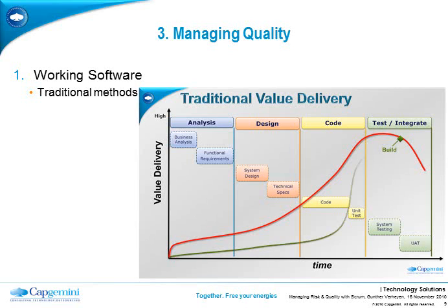As soon as you start, you will not create any working software. You work on paper during analysis, design and so on. You merely work on paper. You've got sign-offs, but that's it. There's nothing that you can taste, that you can feel, that you can use, that you can work with. You can only start working with the software at the time it is being built, and then suddenly, just before that, when the coding starts to end, the unit testing starts, and then the real integration testing starts, you can start using the software and the value is being generated. So for about 2/3 of the elapsed time of the project, there is no real value as in working software.